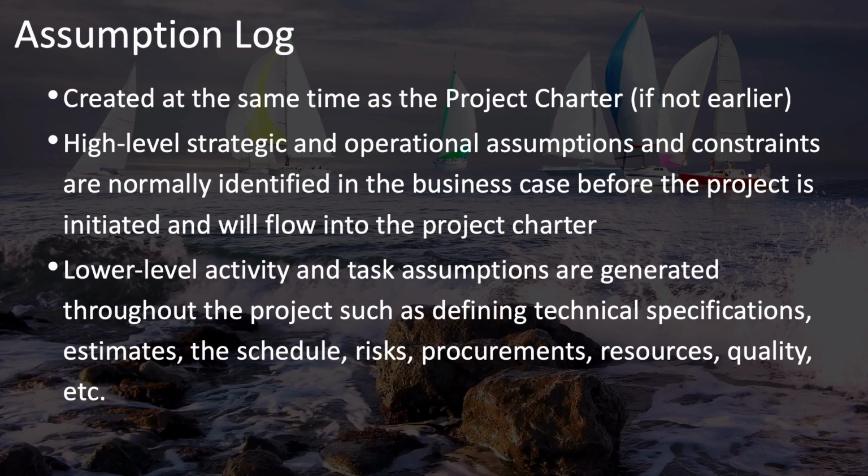You may also assume that operating costs will not rise any higher than inflation. I've seen this one also fall apart. One example was when oil prices started to spike, purchasing tires for very large equipment became almost prohibitively expensive and very difficult to find. Tires that used to cost thousands were costing tens of thousands, many tens of thousands.